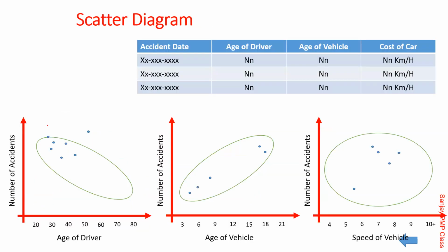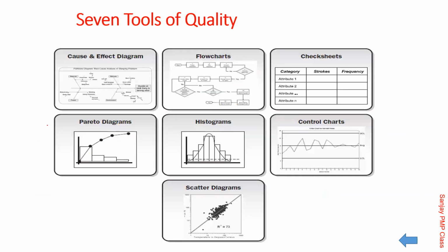And then you will be using, did I give it here? No, but I will come here to Pareto. The Pareto diagram is called 80-20, which is normally seen anywhere. If you look at it here, you will realize that 80% of the issues in anything are coming from 20% of the causes. 20% of causes result in 80% of the damage.